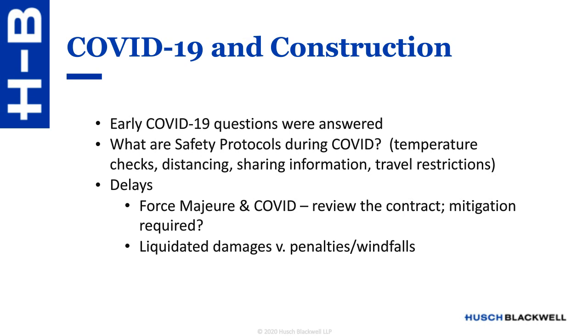We also had a client whose contractor was Canadian, and really early in the pandemic, they decided that they should pull everybody out of the U.S., and they picked up and sent everyone home to Canada. Well, that was obviously not anticipated and a big issue for the developer. So those kinds of things have to be worked through and could be ongoing issues. And that leads to the next bullet, which is delays.